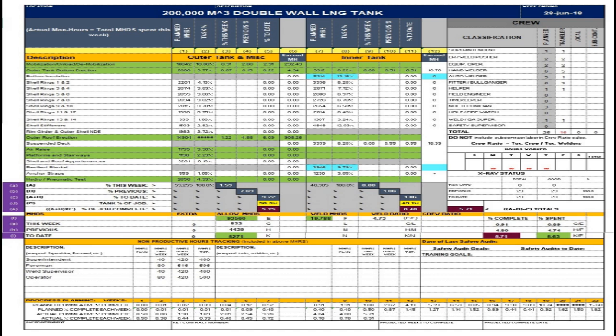It reports 2 project manpower groups. 1. Non-productive supervision, personnel, etc. 2. Non-productive tasks, activities, etc. Next section, Progress Planning, Weeks. Planned cumulative percent complete. First week value equals first week value of planned percent complete each week. Then starting from second week this value equals the sum of the predecessor week plus the value of planned percent complete each week during the present week.